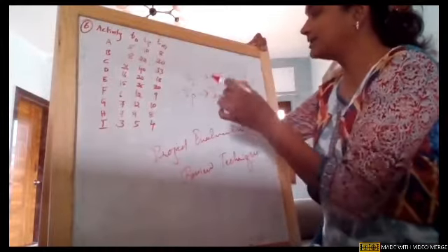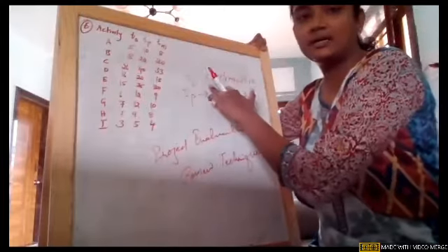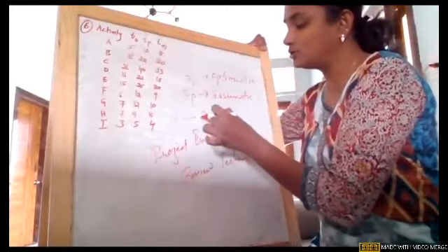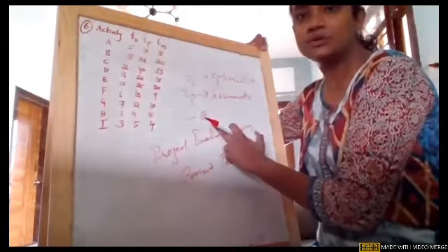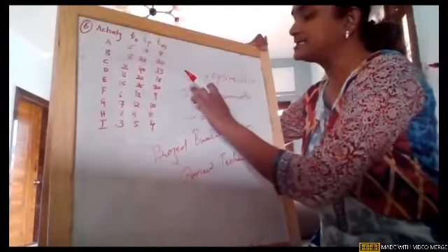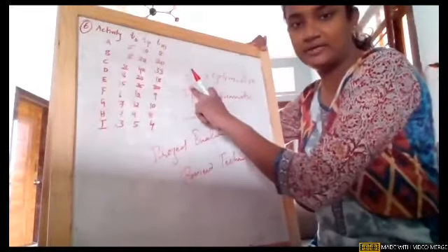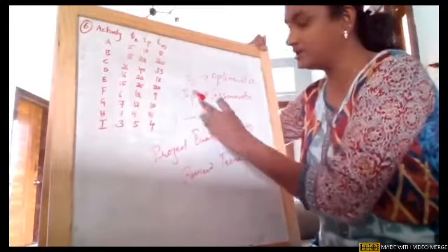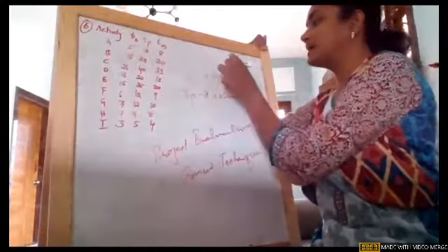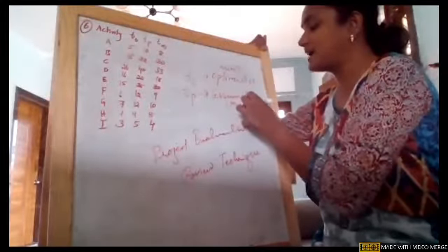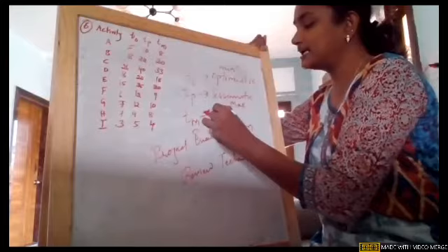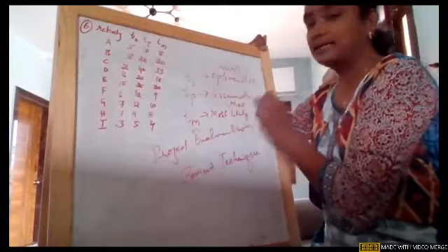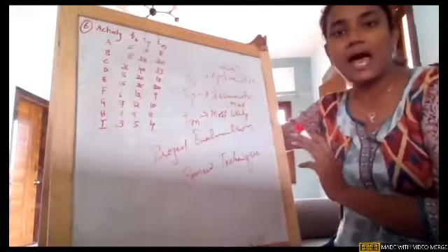That means this is lesser time initially. I mean to say, the range 1 to 2, so minimum 1 and maximum 2. So optimistic represents the minimum duration required to complete that activity. Pessimistic time represents the maximum duration required to complete that activity. So better you can call this the minimum duration, and this the maximum. And the next one, most likely time. There is one more time, which is most likely time, which is nothing but the average. Generally, it is the average time.